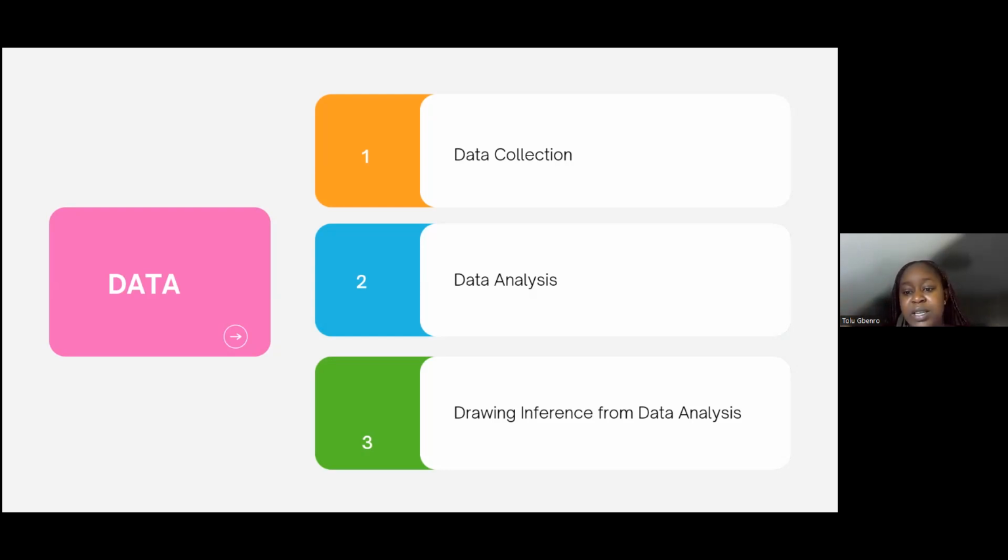It could mean finding the sum, which is addition. It could mean subtraction. It could mean average. And very popularly in this sector, it could mean representing in percentages. So for instance, you want to find the difference between your baseline and midline or your baseline and endline, and convert that data that you have gotten into a percentage. Or you want to find the average of a sum of terms and convert that into a percentage.